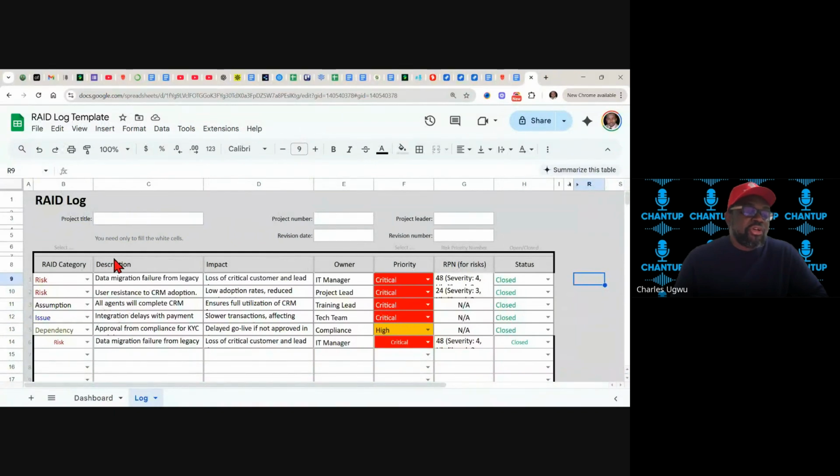You see, the mitigation strategy for a risk is different. When it was a risk, you use overtime, you even work weekends. These are ways we're trying to handle this risk so that it will not happen. But once it has happened, all you are looking for is extension. A project that is supposed to complete in 3 months, you are now begging them to give you 1 extra month. You know, that is it.